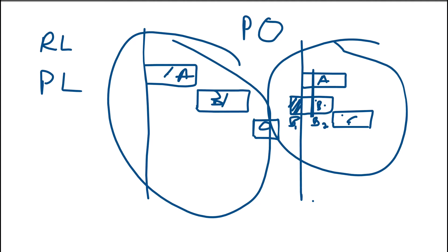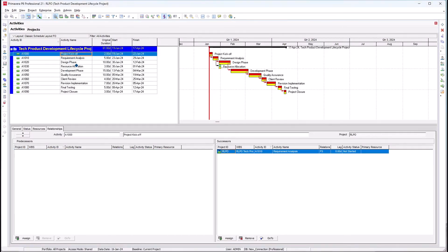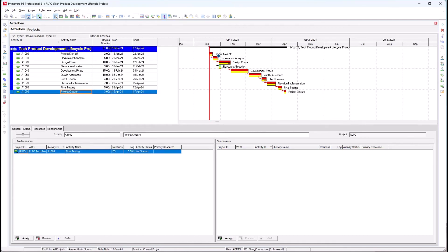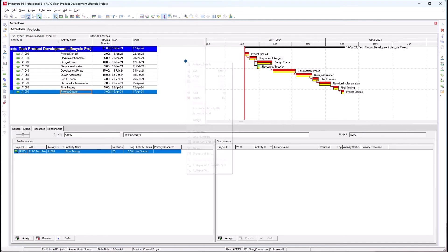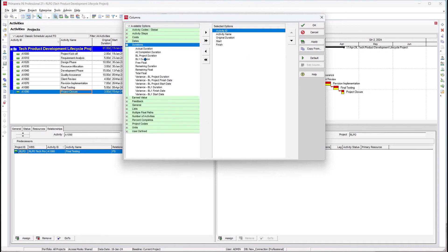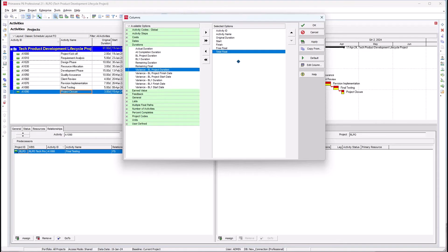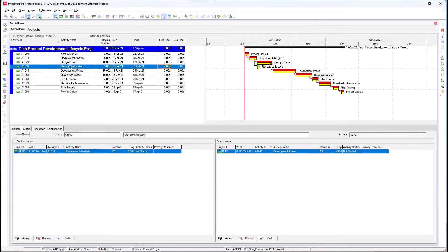Now let's jump into P6 and see how this works. I have this set of 10 activities in the program. As you can see, the red activities are activities on the critical path, and this activity has a free float — so it's not on the critical path. Let me bring up the total float and free float columns. As you can see, this activity — resource allocation — has seven days of float in terms of both free float and total float.